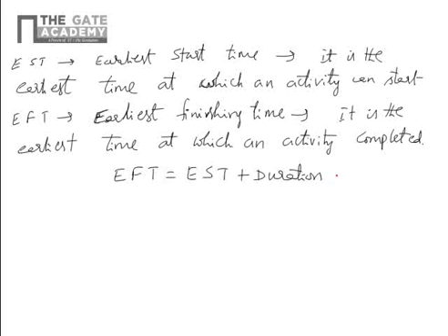In a merge event, EFT is calculated in all the paths and the maximum of it is taken as the EST for the subsequent activity.